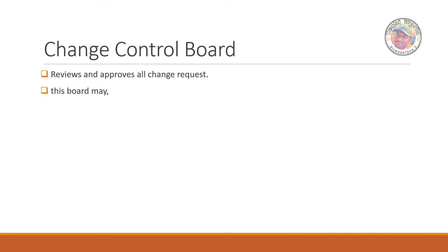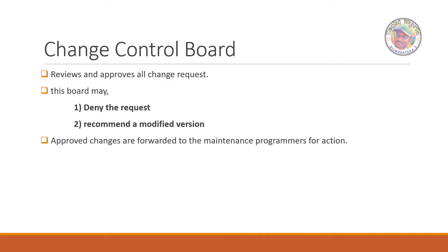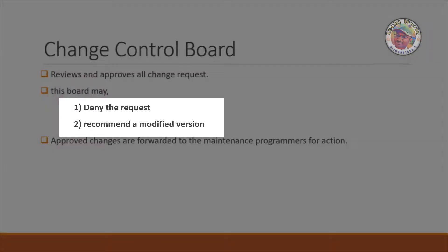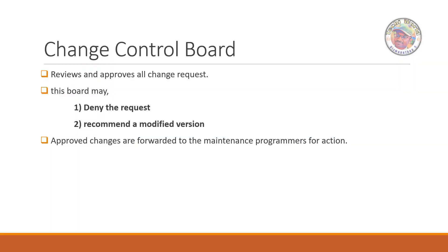What does the change control board do? The request can be done by review. If we approve, the request is approved by the change control board, or it can be rejected — the change control board can reject a request. Or the request can result in a modified version.